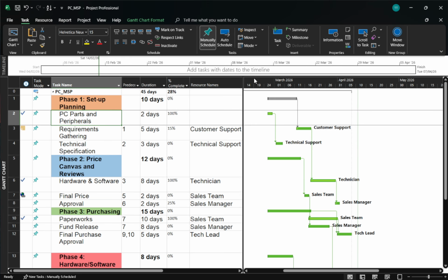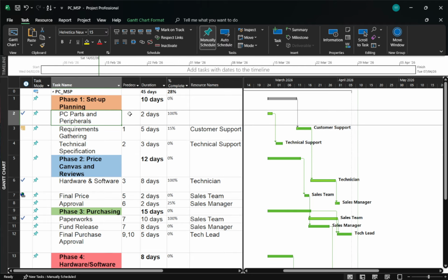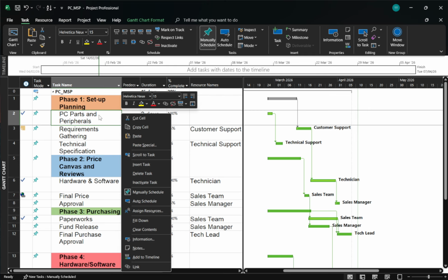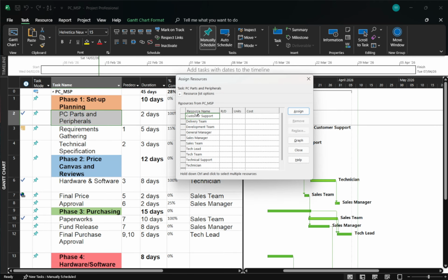If there's no one else assigned, the remaining work is removed from the task. In practical terms, that means the task's work drops to 0, and depending on your task's settings, its duration or dates may adjust. That's all there is to it. By using the Assign Resources window, you can quickly and accurately remove a resource while ensuring your plan stays consistent and your workload reflects reality.